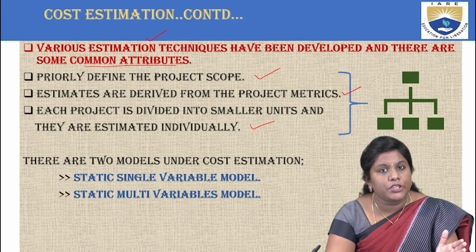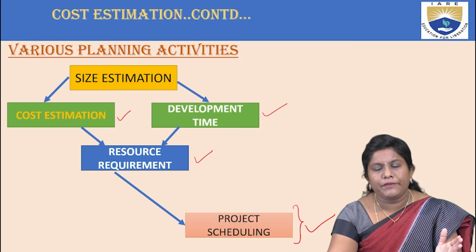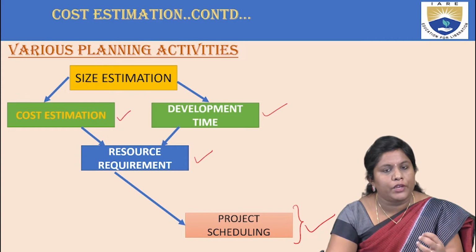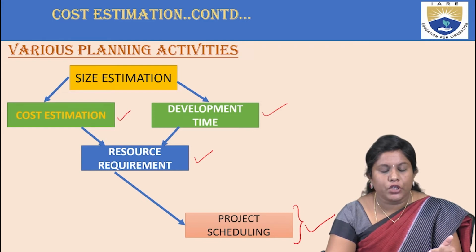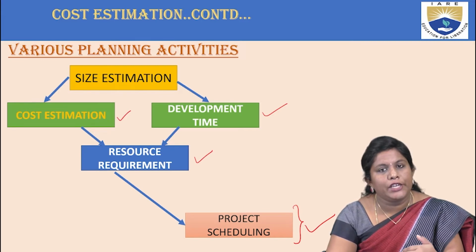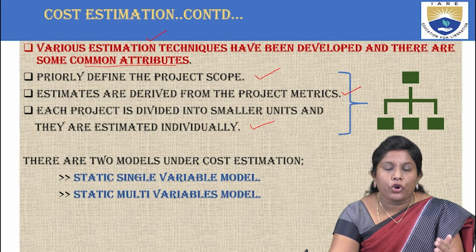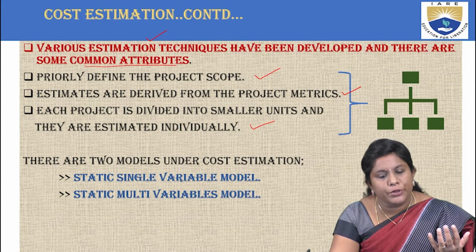Why do you require estimation techniques? As I have previously shown you, for any planning activity, for any project planning or a product planning, firstly you should know the size of the project. Once you know the size of a project, you have the cost estimation and the development time, right? And then you try to know whether the resources are available. And then finally you plan out the project schedule. So basing upon this, we are talking about various estimation techniques which hold some attributes in common.